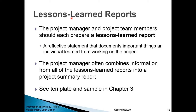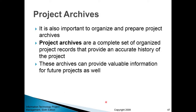You can require teams to submit a lessons learned report by creating a template and making it mandatory at the end of the project. You can also develop project archives — a comprehensive, well-organized set of all documentation related to projects. Consulting companies are very big on this: whenever they have a new project, they first search whether their company did something similar in the past, so they can review archived lessons learned reports, save time, and avoid costly past mistakes.